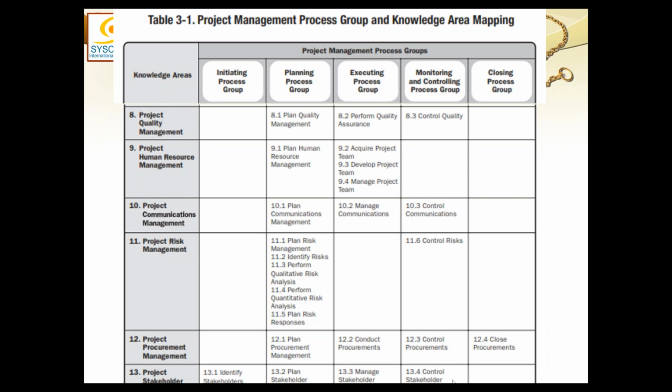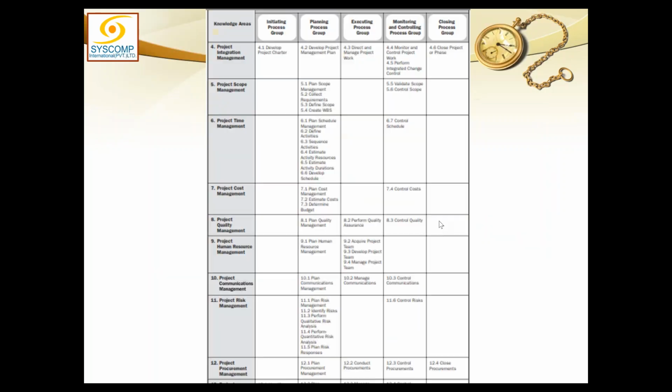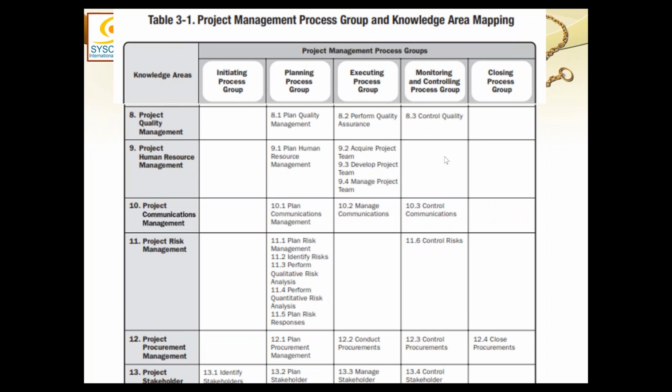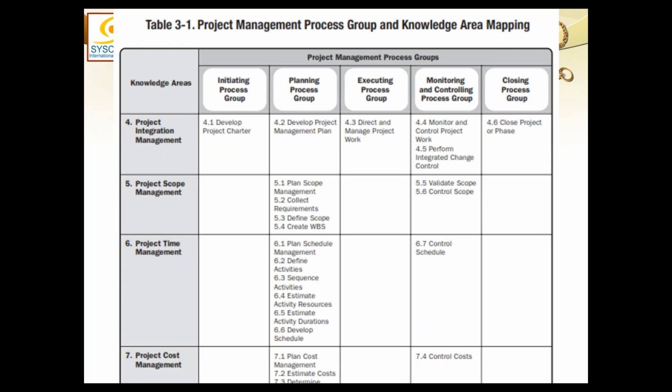Just like communication, in stakeholder engagement, we control the stakeholder engagement. We see how we planned to engage the stakeholders and how actually we have engaged them, what the difference is, and what else we can do to improve the situation. So this could also be a change request. Everything in monitoring and control could result in a change request, while we understand that some of the items in execution can also result in a change request.